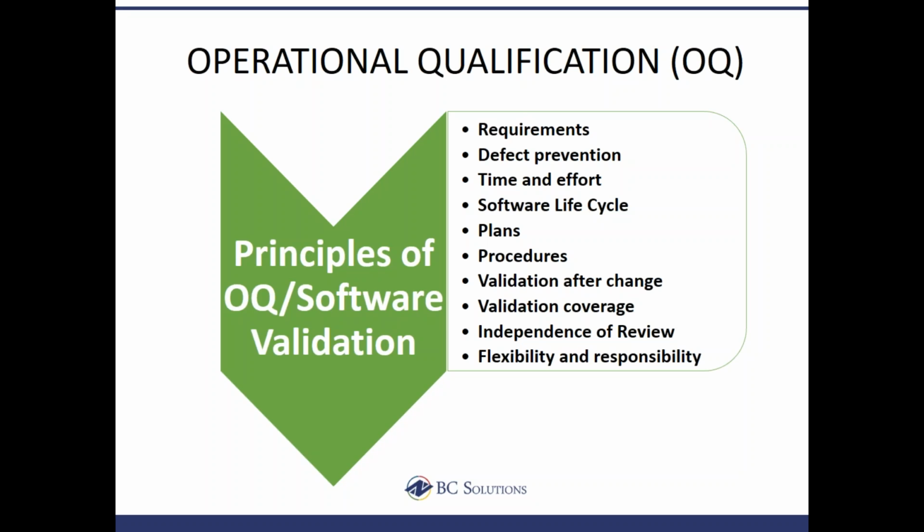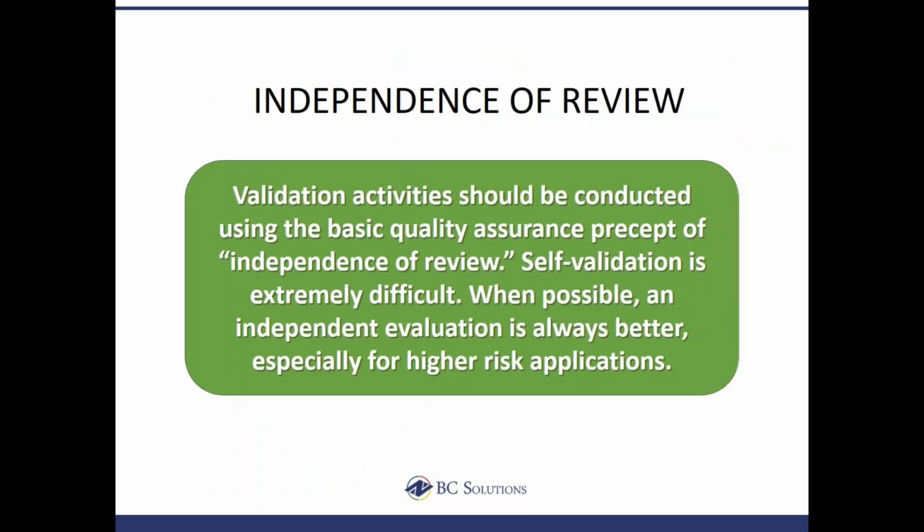Here's one that is very important to the FDA, that there be independence of review. So someone else other than the people who built the system should be either performing it or reviewing it after it's done. And there should be flexibility and responsibility. So these are all of the principles for OQ validation.